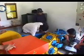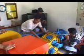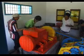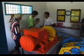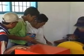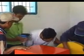In mid-2000, funding for the upgrade was approved by GEF and the physical work started in November. A contract for the supply, installation and commissioning of the hardware was given to the GTZ MHPP technical counterpart, PT Hexa Prakasa Teknik from Bandung.